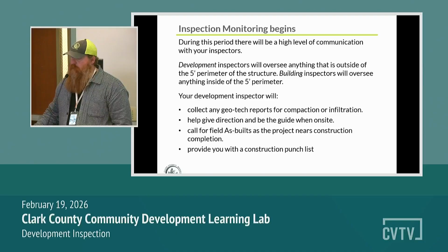Your development inspector will collect any geotechnical reports for compaction or infiltration, and this is going to be on trench backfill, gravel base, asphalt, sidewalks, infiltration galleries, any sort of these construction items that we're looking at. We will help give some direction and guidance when on site. We will not direct your work. If your site inspector is directing your work, they should not be.